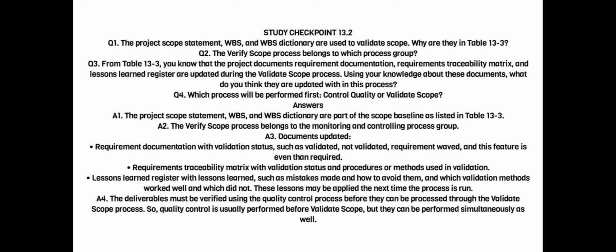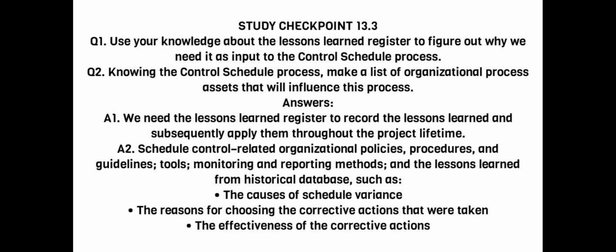A4. The deliverables must be verified using the quality control process before they can be processed through the validate scope process. So, quality control is usually performed before validate scope, but they can be performed simultaneously as well. Study Checkpoint 13.3. Q1. Use your knowledge about the lessons learned register to figure out why we need it as input to the control schedule process. Q2. Knowing the control schedule process, make a list of organizational process assets that will influence this process.